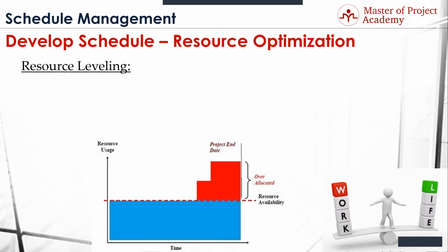Now, if you take all of those hours and move them into your normal 40-hour week, what does that do to the schedule? Does that extend it? Yes, it's going to extend it. It's going to make it longer because I was counting on Dave working 16 hours a day for the next week. Whoops. I've got to reallocate Dave because he's going to be really upset if he has to work 16 hours. So I'm going to take all those hours and stretch it out to the second week. Well, that changes the schedule. So yes, it can be done, but it does increase the schedule.